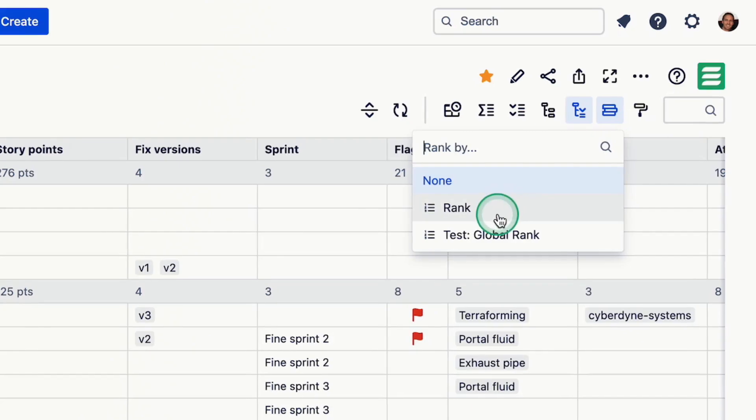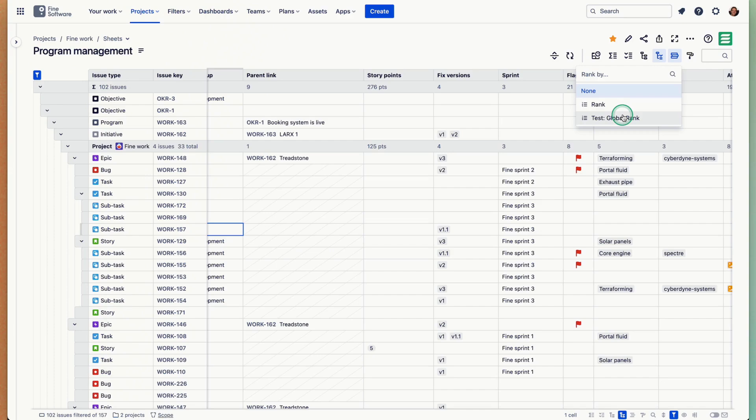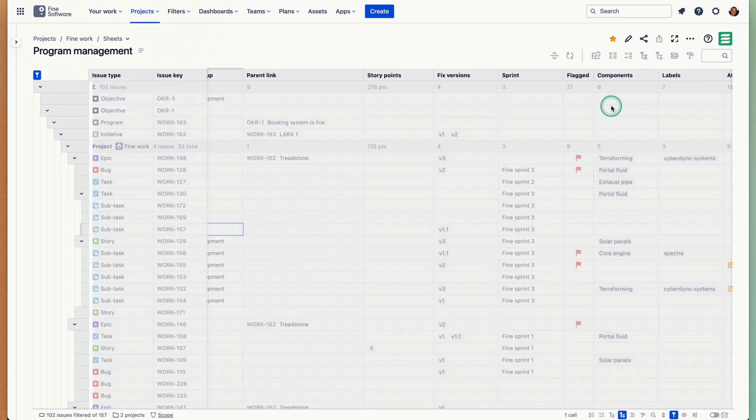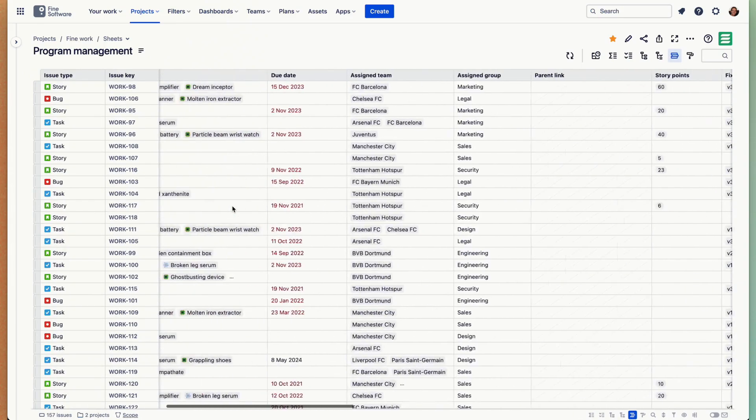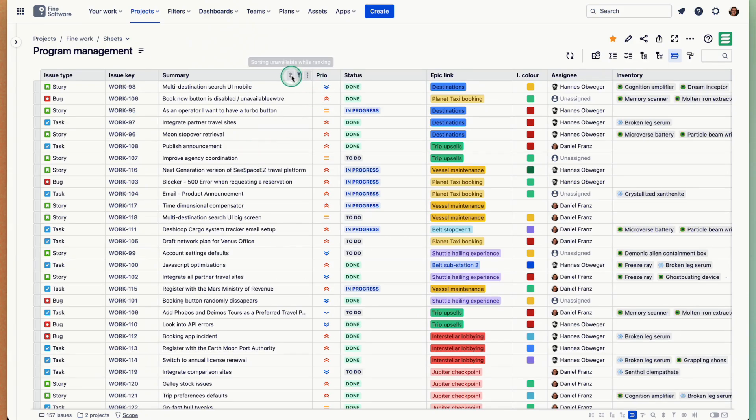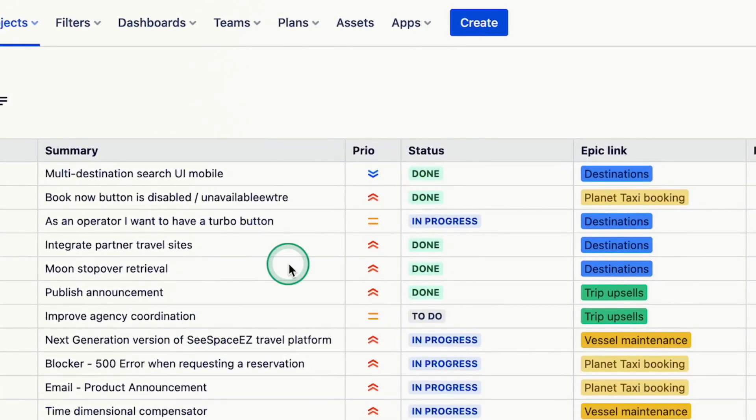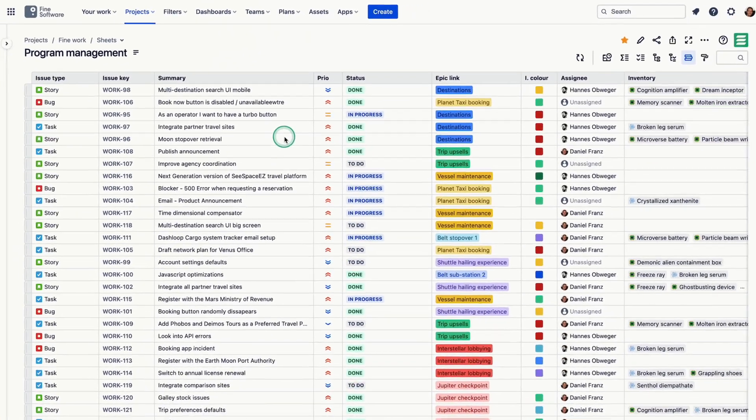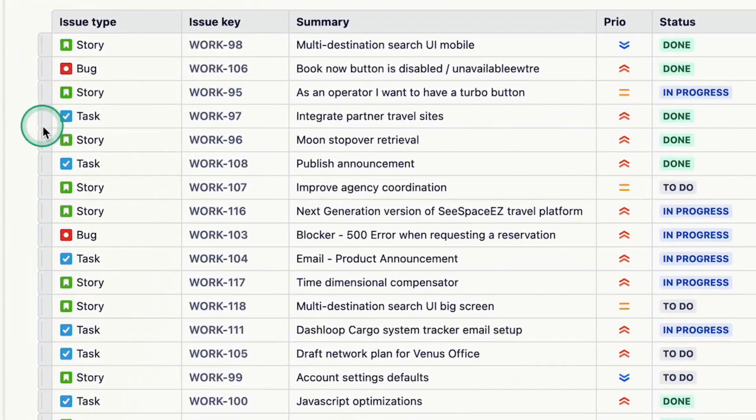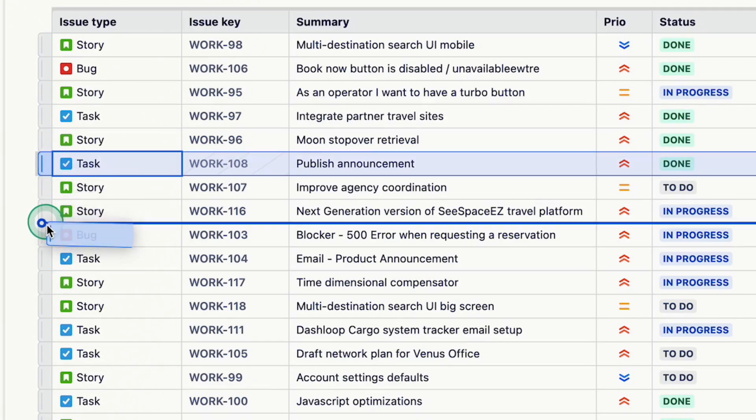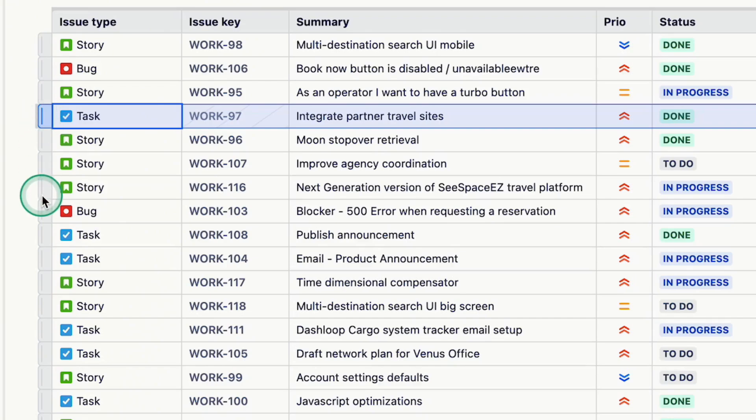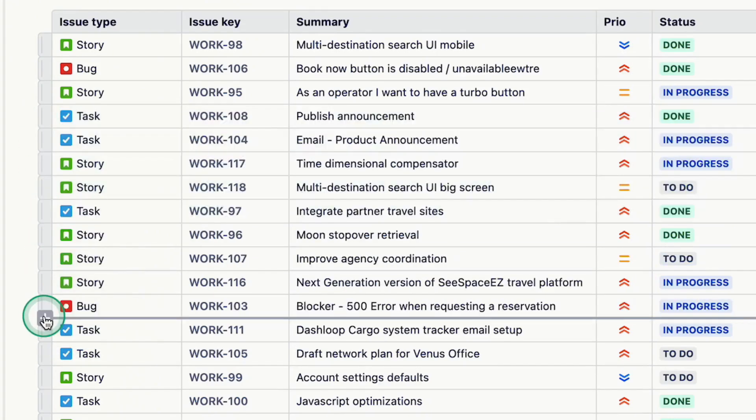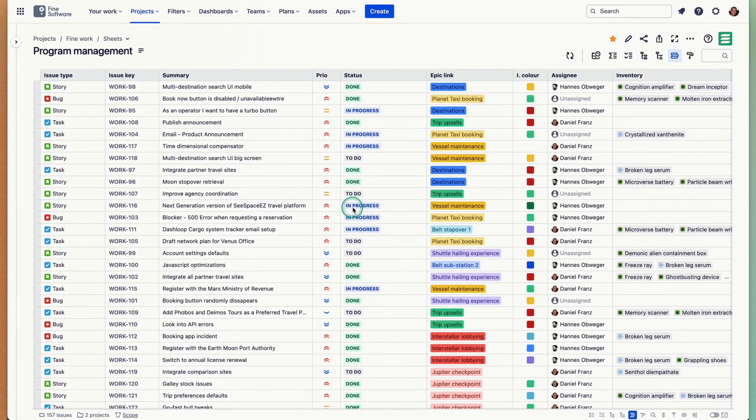Let's switch over to ranking. If I switch on ranking, you might know that you can configure multiple rank global rank fields in Jira. If you have them you can switch between them. I'm going to pick this rank field now. The issues here are sorted. I can't do sorting anymore, this is overwritten now by essentially an order by rank statement. You'll see here I have these grip lines on the handles of the rows. I can just take this now and move it, or I can take multiple and move them. What happens under the hood is that the rank field is updated accordingly.